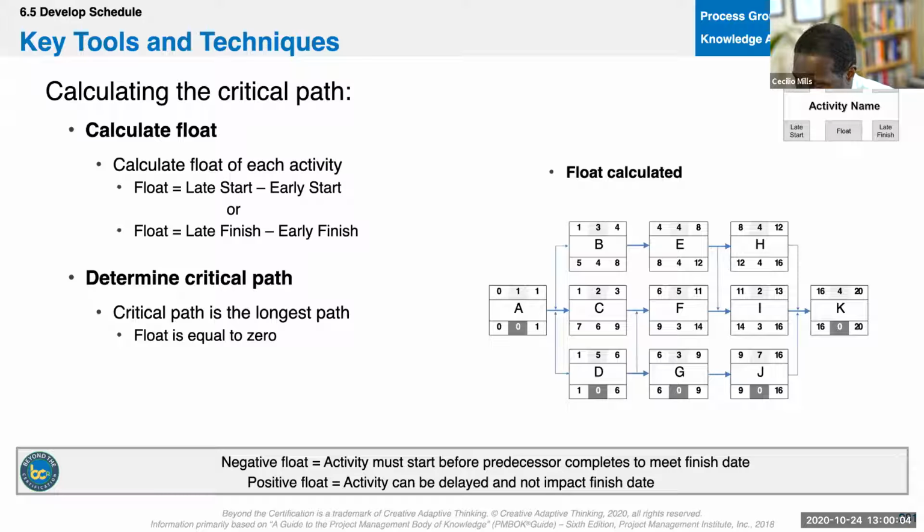It tells us that I need to be putting all my effort and energy into making sure we order the right products, we've got the best resources on here, we've estimated accurately. If anything, we do some mitigation. We add some things, we take some action to minimize the probability or the impact of anything negative happening. So we have to do all that here. Whereas on these days, we could probably play around and train people, because if we miss a couple days, it's okay. Not going to hurt the project, right?